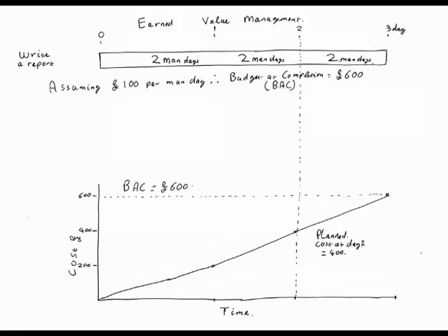After the first day I will have spent £200, then £400, then £600. So my budget at completion for the whole work package will be £600. That's my top line there. And when I've done all that work, I've finished the work package.